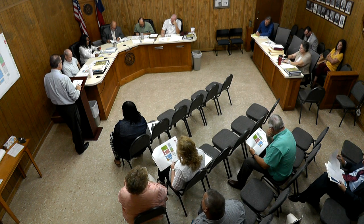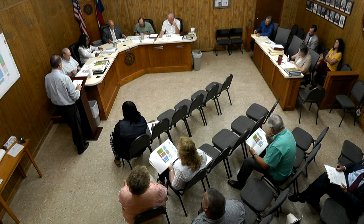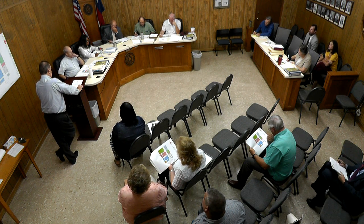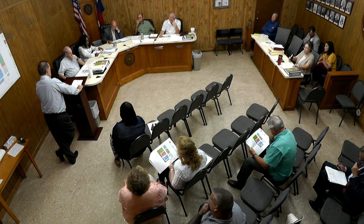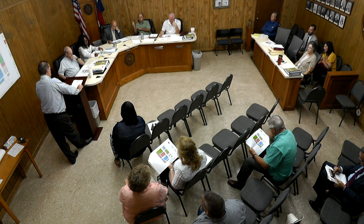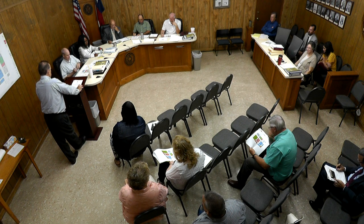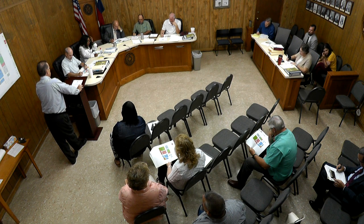And the goal, from my understanding, is that you want to be at the 8 million range. So, our cost estimator has been conservative, he's been pushing in the 400 range. So if you're at $400 a foot, which I think we can be cheaper, that's 8.6 million, 8.7. 350 a foot is 7,610,000. What is it again? 7,610,000. That's at $350 a foot.